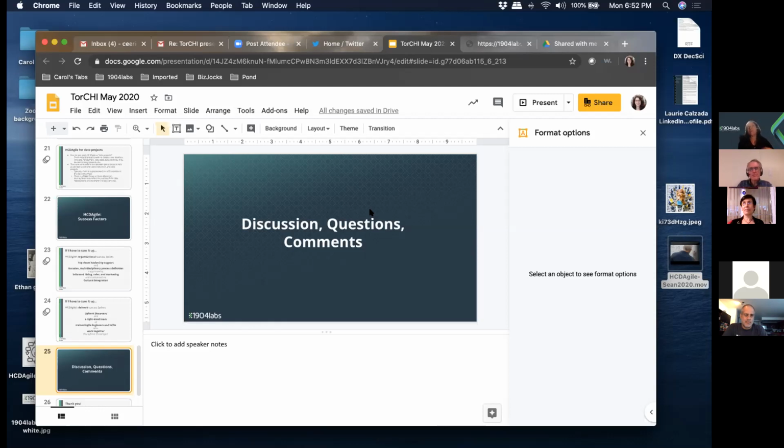So best practice, I would say, having that initial alignment again, and that story mapping, that big picture. We have standard things that we do on every project. And I would say story mapping is the thing that avoids that Frankenstein solution, because it's not shelfware, right? We don't just do it and then move on. We're always coming back to that story map, and the story map is the big picture, and it is holistic, right? Because it shows you the spine, and it shows you all the feature details.